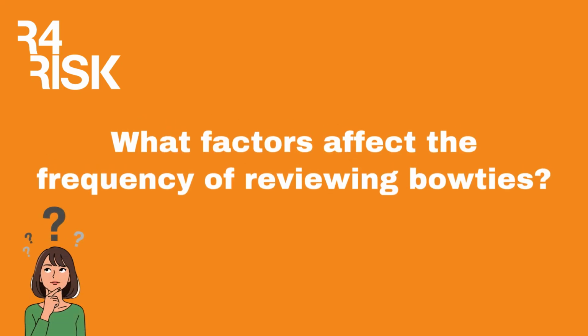What factors affect the frequency of reviewing bow ties? So there can be regulatory standards, of course, if you're under major hazard facilities, and that is during your license period, depending on if that is 5 years or whether there's other conditions on that.